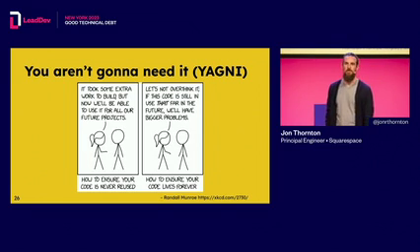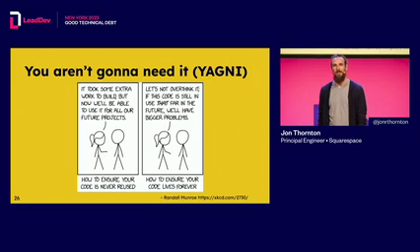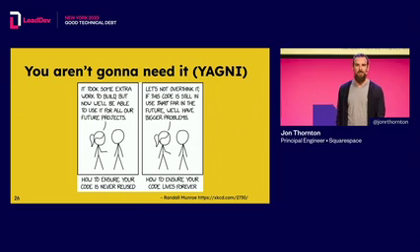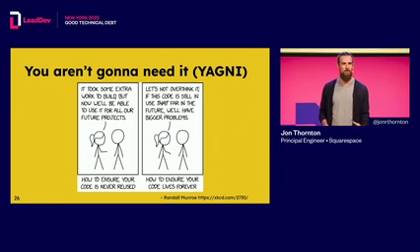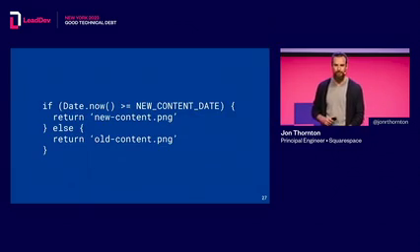So there's an old extreme programming slogan, "You aren't going to need it," which can be shortened to YAGNI. And the point is, most of the time, people tend to misjudge the future problems that will need to be solved. This is an innate bias, and it takes conscious effort to overcome. My team on the email project latched onto YAGNI as an appropriate interjection in scoping conversations. If someone said YAGNI, it meant that they wanted to call out that potential bias and dig into whether the thing we were talking about was really needed.